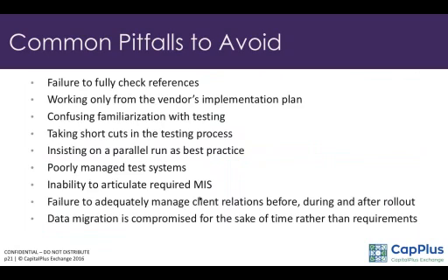There are certain strategies that are adopted to ensure that data is correct. You can do hash totals. There are lots of strategies that you can adopt. You can transfer two files, merge it, and see whether it's the same, stuff like that, whether there's data corruption that has occurred during migration. There are a lot of things that need to be done. These things are not done.